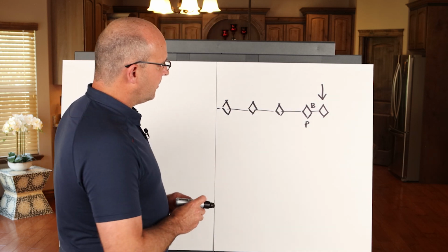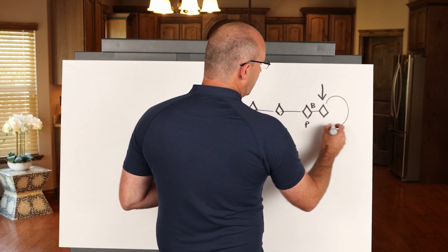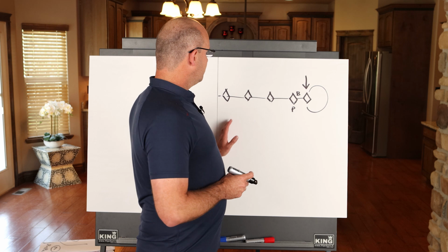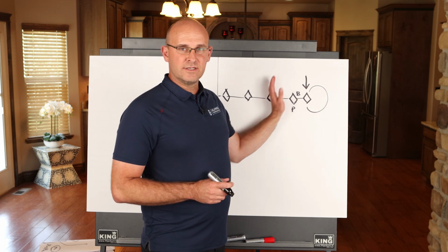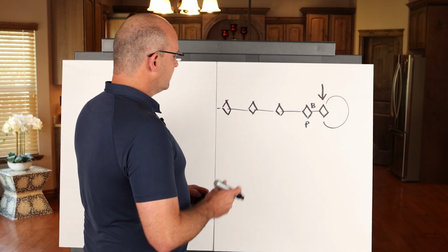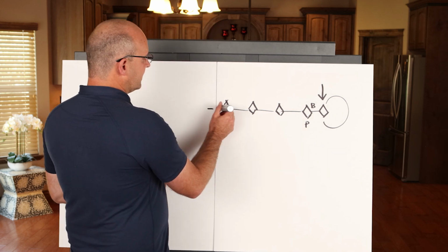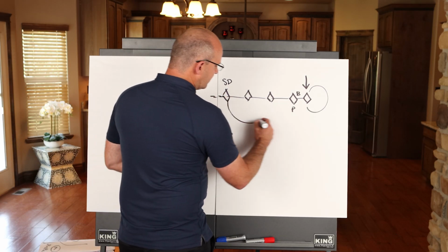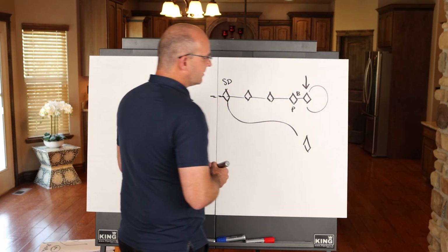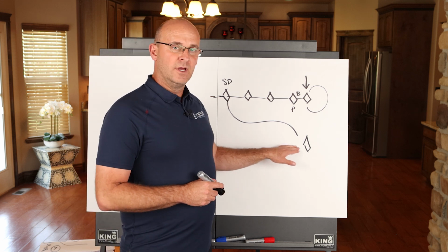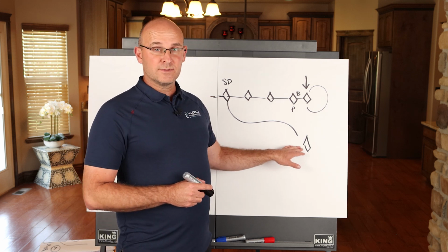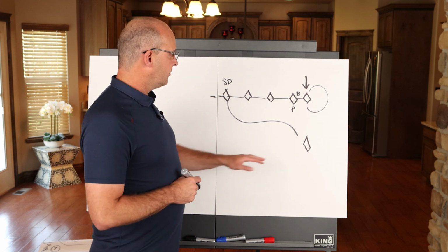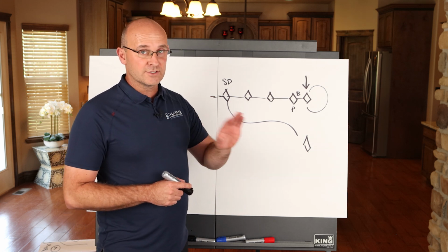The reason this is important is because we don't just want to target this end date over here, because typically work will fill the space and procrastination will take over. It will end up in a crash landing over here. So this gives us some targets. Let's say that this first milestone was your schematic design. This milestone taken over here allows us to do one of two things. We can either use the Scrum system or the last planner system to hit that milestone, or some permutation. You can even use the TAC production system, but you're working to this milestone only so you can focus.